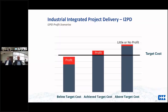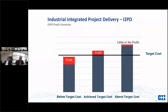Here are three profit scenarios. On the far right — above target cost — you've exceeded target costs, eroded all contingency funding, and are eating into your profit at the end of the project. On the left-hand side — below target cost — you've brought the project in ahead of schedule or under budget, preserved all contingency. So you get a shared portion of that contingency or risk pool, and you get 100% of your profit. In the middle, if the project goes exactly as planned with some known unknowns that crept in, you've spent all contingency but preserved 100% of your profit.